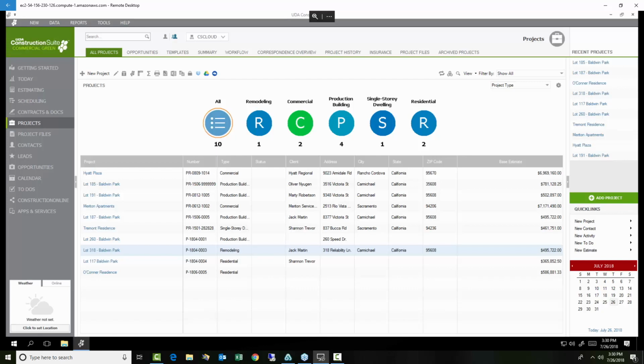Now, it looks like as you're working through that, there's a couple of common questions that crop up. First and foremost, if the project does have an existing workflow and you want to replace that workflow, that's how you do it. You just edit the project, choose a different project type, and go from there. If you're concerned about losing the existing steps, I would recommend against replacing the workflow because it does completely erase everything and overwrite it. For most of us, though, that's a non-issue because, again, we either have good workflows and we're using them when we're creating new projects, or for a lot of the people that I've worked with, unfortunately, and it pains me to say this, there might be no workflow in place.